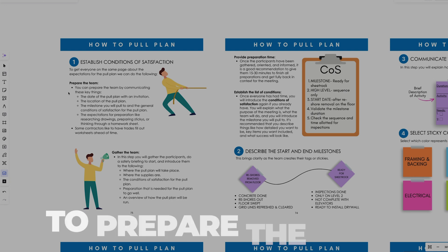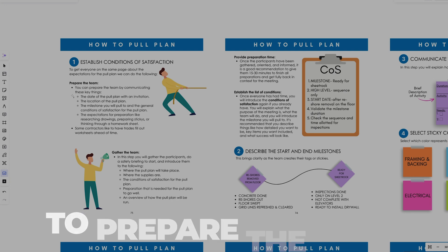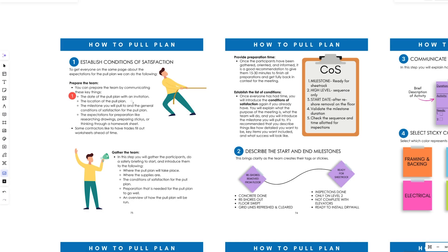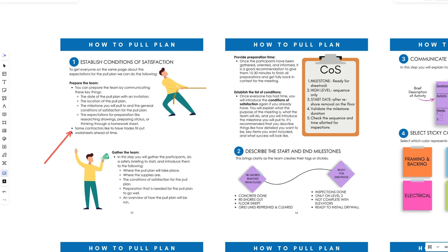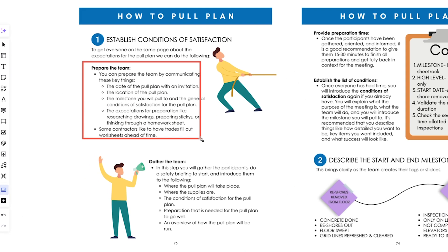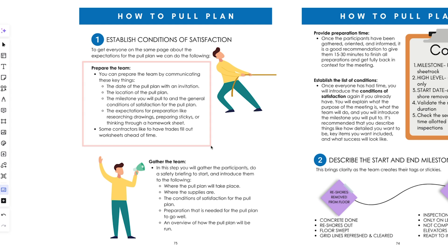The first thing I like to do is prepare the team by communicating the date of the pull plan, the location, the milestone we're pulling to, and the expectations for preparation. Sometimes I ask trade partners to fill out an Excel template so that they have their tags, stickies, and activities with durations and crew counts ready to go.